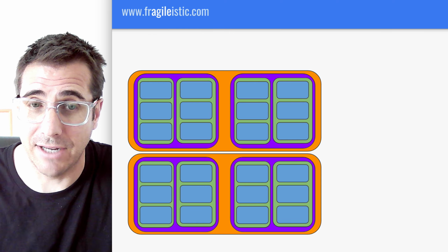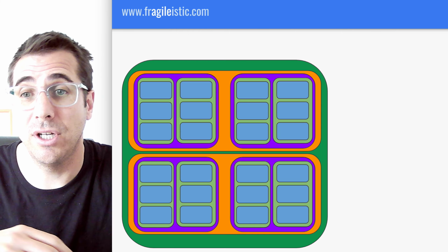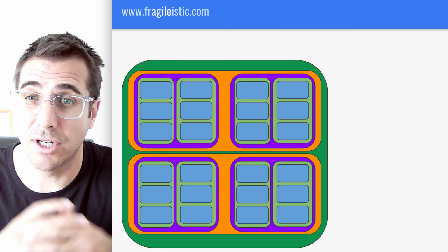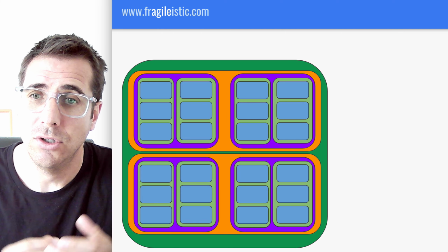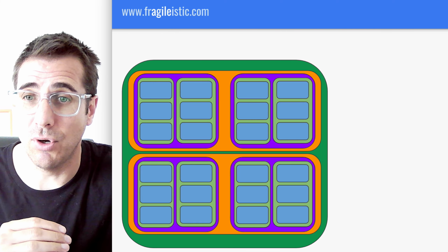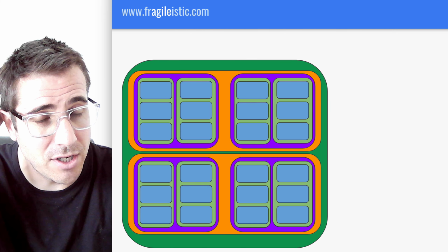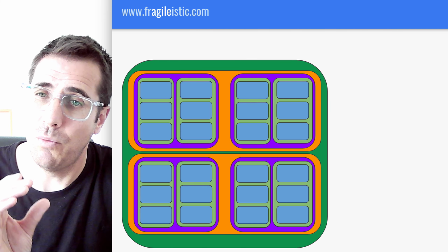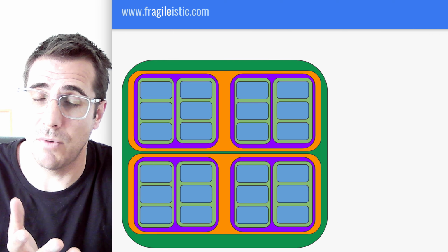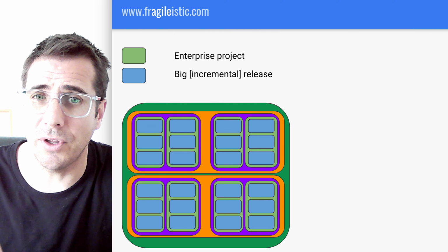And then it also allows you to extend it even further and say, well, actually, all of that work belongs to a project which is funded in a particular way. So in Azure Boards, you have more tiers above. You still have the 3 tiers at the bottom, so teams can still work with tiers in the same way as Jira. But what Azure Boards offers is a scaled approach where you can do this. So that really is the difference between the two.